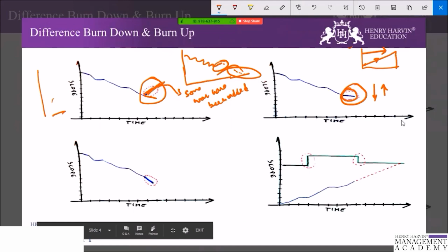So what will happen here? We will say that some amount of work has been added and some amount of work has been completed, which is not giving the right picture. Unfortunately, if you go to the third line and try to understand what is happening here, if the added work is less than the completion work on that particular day, it will come down, but we will never come to know that there is some addition of work that has been done here.